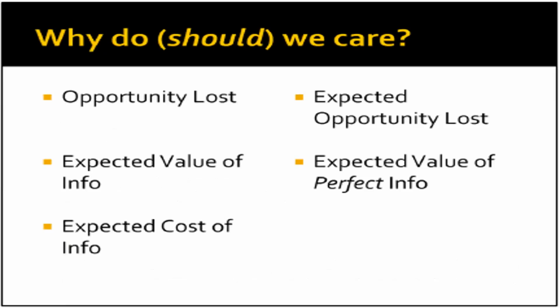Another measure that is also asked about is how much does this cost? Again, this is a different way of looking at the value of the information as well as opportunity. You can answer this question by finding the expected cost of information. On a basic level, this is just how much we might expect to pay for a reduction in our uncertainty. How much it costs to get the information that will help us in determining our reduction in risk. You need to know the range of each of the possible outcomes of a measurement, the cost of each measurement, the expected reduction in uncertainty for each, and then find the average of each of these. Next, you decide if you need to assign a weighting factor to any of the averages and add everything up.